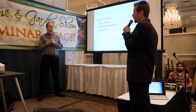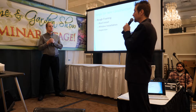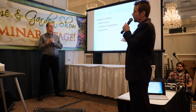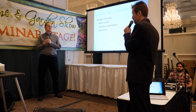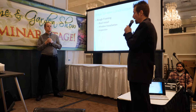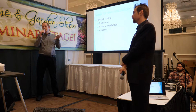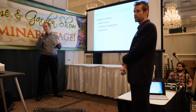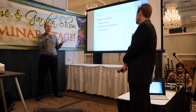Again, I've seen it where there are delays in the house being built, and then years later the owners have mold issues. It's because they didn't get that property watertight as quickly as possible. It's very important so that you don't have water behind the wall. You want your roofer scheduled to come in and put in the roof the day after the framing contractors finish putting up the roof sheathing.